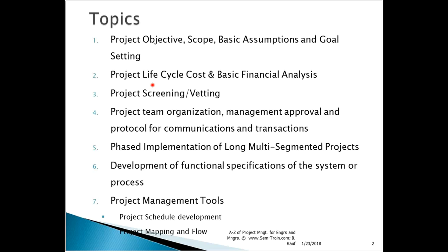So bottom line, whenever you take on a project with a specific endpoint, mission, and objective in mind, you want to make sure that you capture the entire cost of the project, not just the initial cost. That's where the life cycle cost comes in, and you'll see the emphasis on how a life cycle cost is so different from, and so much more inclusive than, just the initial price tag of a piece of machine. And then we'll get into project screening and vetting.